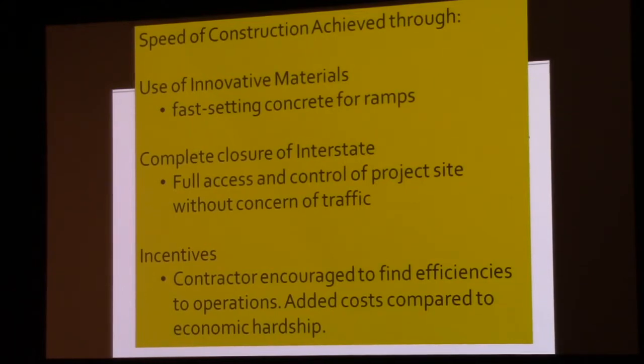These are some of the key concepts we've seen threaded through all of the previous presentations. You looked at what made it quicker, why they were able to complete the project ahead of time. Use of innovative materials. In this case, they were using fast-setting concrete on ramps, different types of high-performing materials that can set quicker and get the strength they need so they can open it up to traffic.